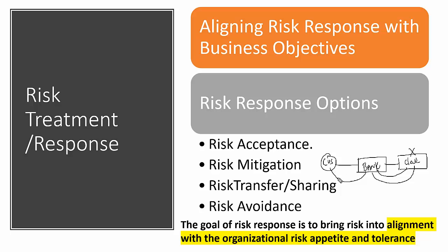In this risk transfer case, we have transferred the impact to a third party, but you cannot transfer the accountability. Tomorrow, if any security breach happens in the cloud, it is still the bank that is answerable to the regulatory authority, and it is responsible to the customer also.